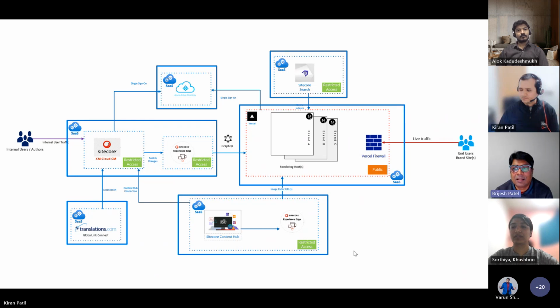So start with content. Of course, the development and QA will be in place, but think of having the content strategy, content inventory, build a sitemap, think of redirects, think of SEO content during the initial phases of the project kickoff. Another thing about content is, being a developer, if you are more into technical, into backend development, you think, why can't I just package all the content from XP and move it to XM? You will have to think very carefully.